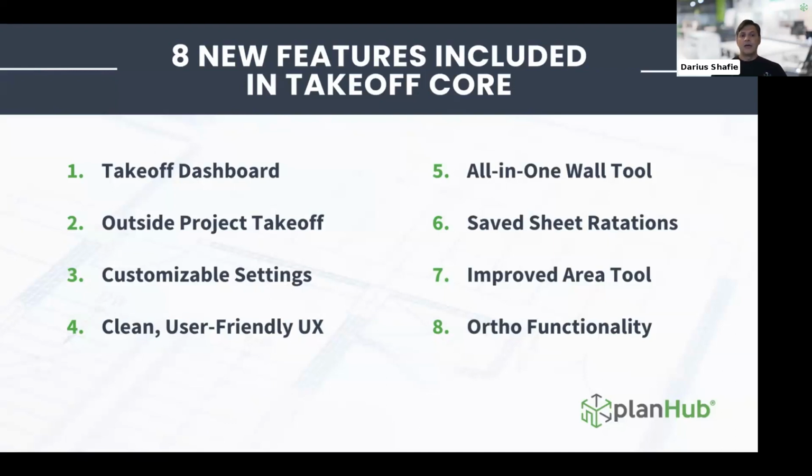And also another tool that we have, which is like the area tool, that's also a Swiss Army knife, because not only do you get the area of, let's say, for example, the surface area of a room or a specific area. Not only do you get the surface area in square footage, but you also get the linear footage for the perimeter. So imagine if somebody had to calculate, well, not only do I need to put flooring in this particular room, but I also need to account for the baseboards that will go in there, right?